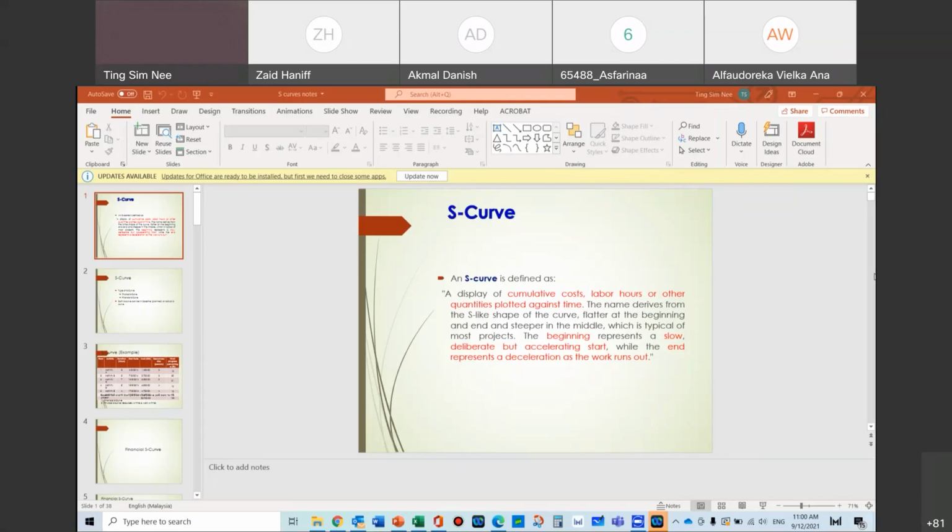There are many cases whereby you have a top-down budget. If you work for a government agency or some private clients as well, there are top-down budgets, meaning that they have certain budgets. Like, I want to build this drain to cover flooding purposes, so I have a 5 million budget. And with a 5 million budget, I will get you, the engineer, to do design, conceptual, whatever. At the end of the day, you work within that 5 million.